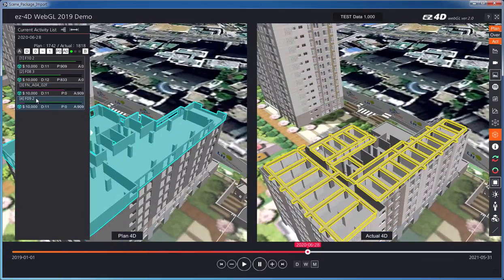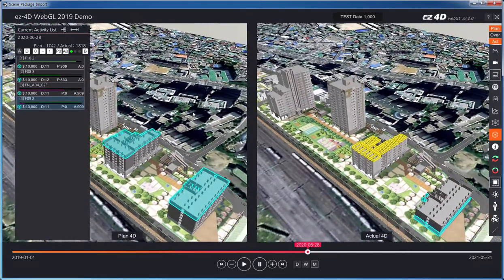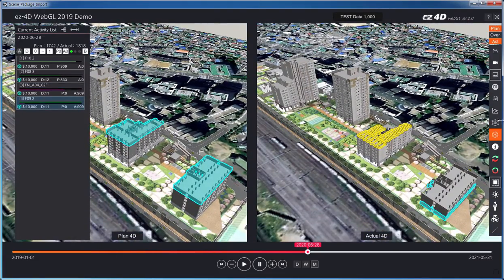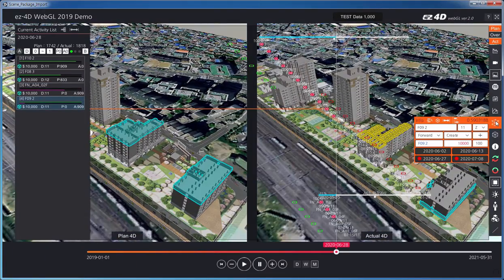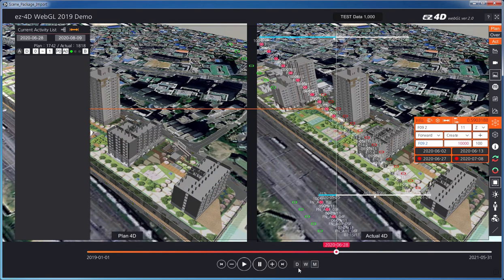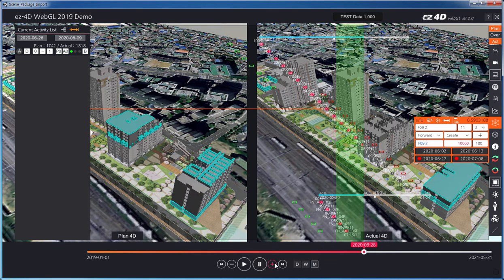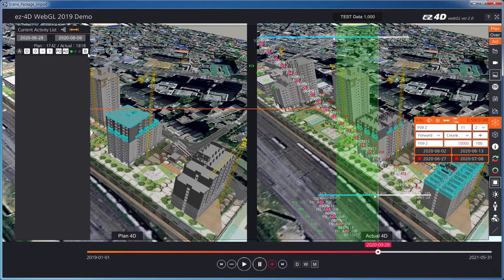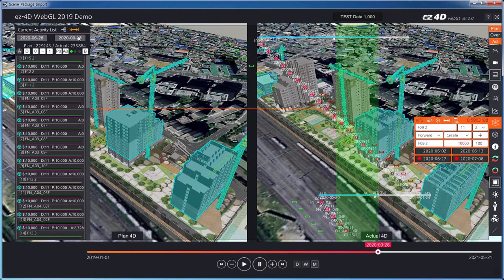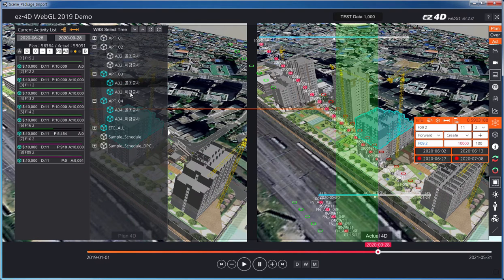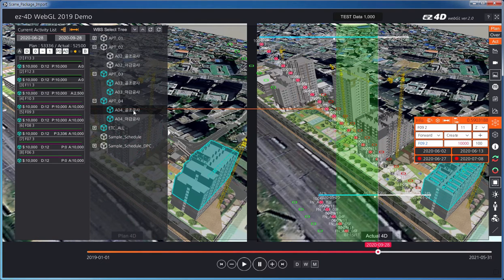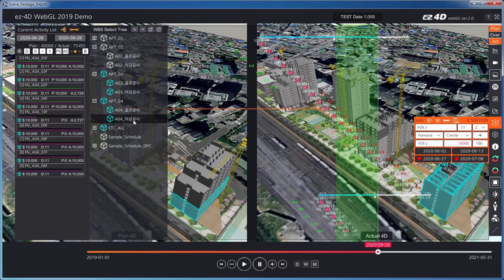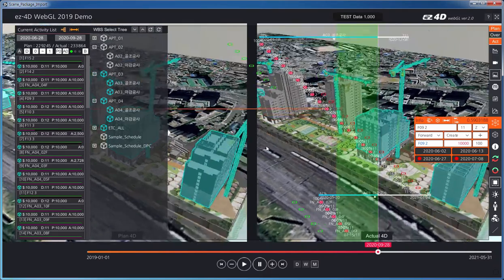Click an activity currently in progress to find the corresponding 3D model immediately. Users can identify activities of the current date, see which activities are progressed and how far they have progressed, and determine the total amount of activities for a certain period using the 3D model.